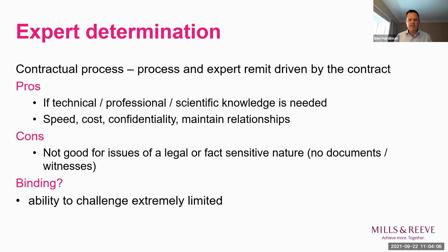Yeah, I think there are. The problem is that, as I said earlier, this is a contractual mechanism. So the scope of the procedure, potentially even the identity of the expert to be appointed, and that person's remit are all driven entirely by the provisions of the contract. So the main downside is that when the parties enter into the contract, they don't necessarily know the scope of the potential dispute, which may not arise for several years. And that can mean that an expert determination process is entirely unsuited to the dispute that later arises, but by the nature of the contract, they're bound into it.